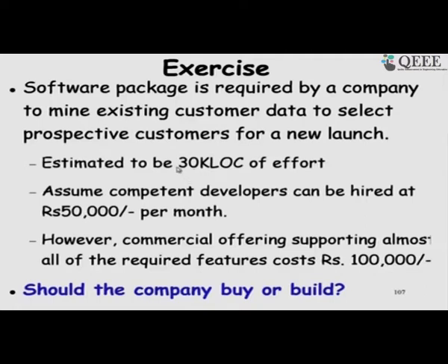So, that is the effort in person months, and each developer needs to be paid 50,000. So, 50,000 into 76 or 77, whatever comes out, that will be the cost, which is much more than 100,000.